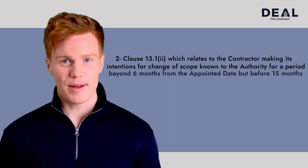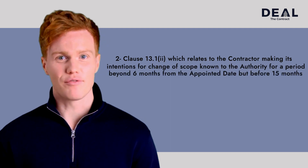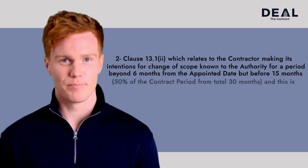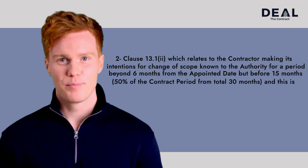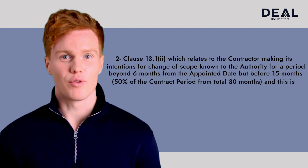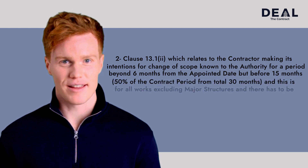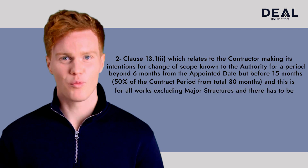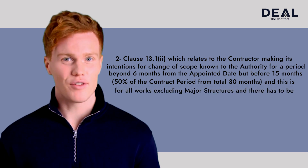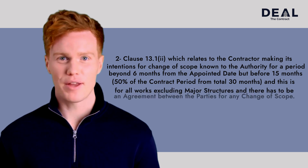Clause 13.1.2 applies for a period beyond six months from the appointed date but before 15 months — 50% of the contract period from a total of 30 months — and this is for all works excluding major structures. There must be an agreement between the parties for any change of scope.